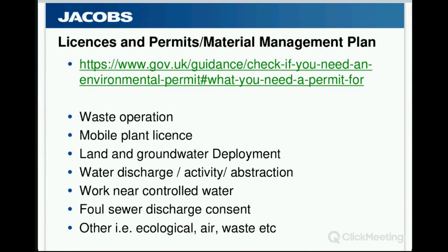The permits can take between 4 weeks and 4 months, depending on what it is you're after. So make sure that you're on top of these. Have an early word with the permit provider and ensure that that permit is theoretically viable. I've had a number of projects where we've made assumptions about, for example, a permit to discharge to a foul sewer, only to find out that we can't discharge our effluent to the foul sewer because the downstream wastewater treatment works cannot accept those materials. It's also prudent to make sure that your contract has the mobile treatment license as part of your contractual compliance, as part of your remediation strategy.